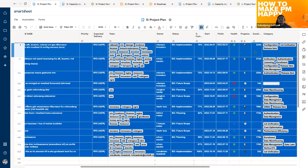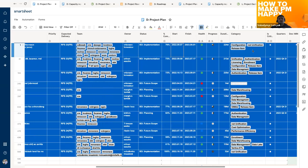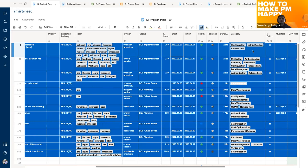Besides this, 'duration' is the actual difference between the two dates, and we only count working days — Smartsheet is smart enough to filter out weekends and holidays. We have a couple of category columns used as a tagging tool in case you need to create reports in the future.